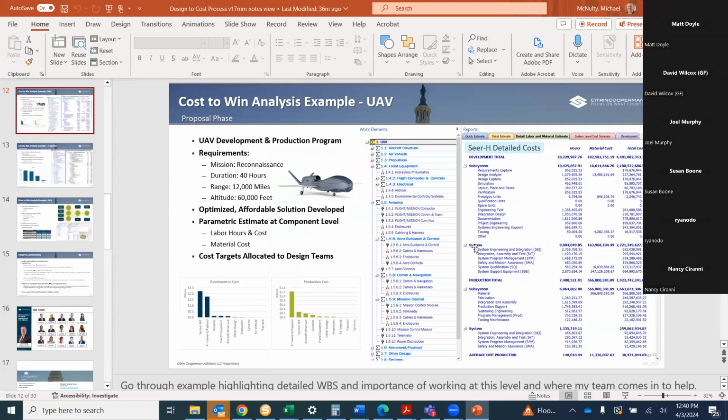And if you get too far away from the midpoint, to the left of the midpoint, they start to blow up. And having the data in your analysis to help you work through the problem is very important not only for your team to keep you on track, but it's also very compelling when you're working with executives because you've done your homework and you can show them where the program can go and where it can't go.